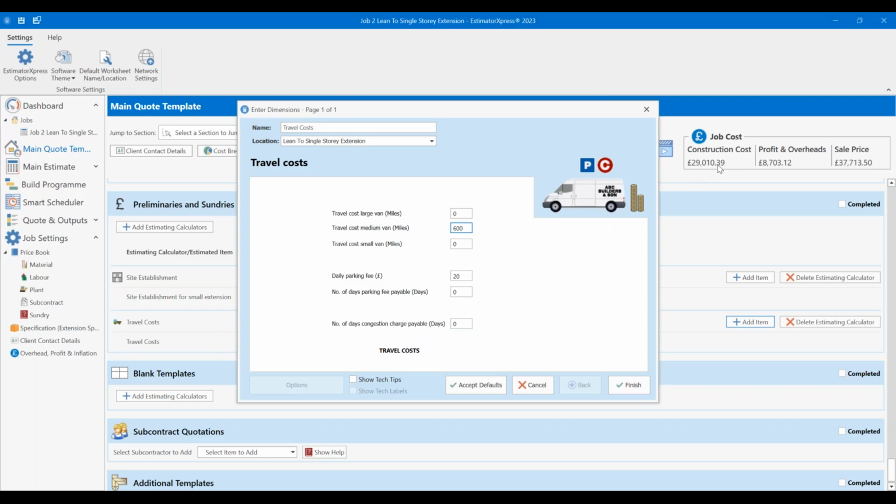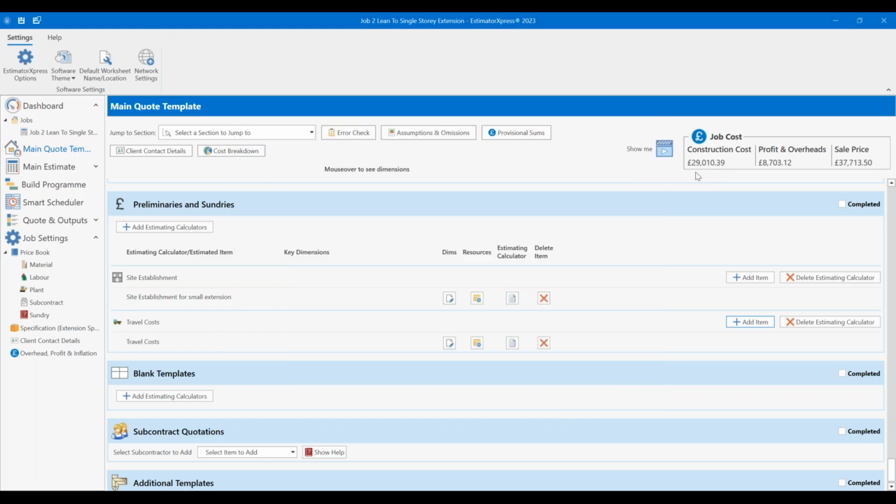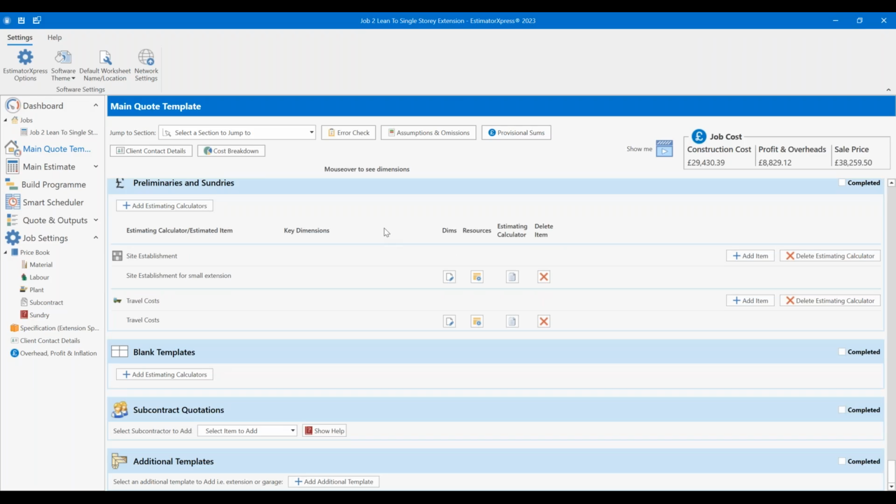at the cost of our job, just over £10 per 29,000. So 420 odd quid. That's your fuel running costs allocated towards that vehicle. So it can make a big difference, especially on a smaller job like this, especially if you've got that distance to travel. There's one or two worth noting.